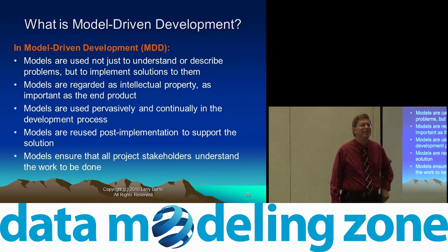Okay, a couple of weeks ago I was chatting to a guy and his job title is Agile Coach. So he mentors the Scrum Masters and all the rest. And he is not a developer and he is definitely not a data modeler. And he said that the velocity on the project was a concern to him and it was getting worse. It was going slower and slower. And he perceived that the problem was reworking and reworking what they'd done because they didn't have a data model. Now remember, this is coming from an agile coach.